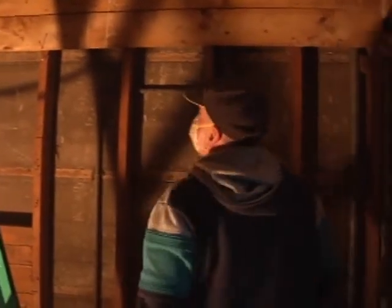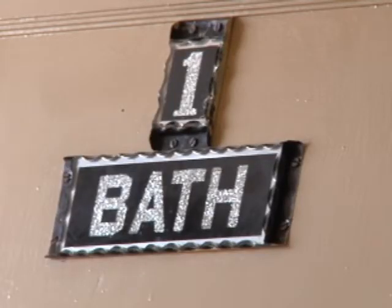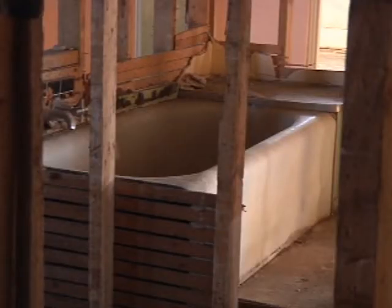With the hotel being designated as a heritage site, the crew has to be especially cautious not to destroy anything that has a historic value. Wherever we can preserve the lath and plaster upstairs, we're going to try to do that. Obviously the outside walls have to come off because they have to be insulated, and some ceilings will have to come off as well. But especially the 3rd floor where the doors are original, where the transoms above the door are original, and the moldings and so on, those should all try to be maintained. Some of the moldings on the windows as well.